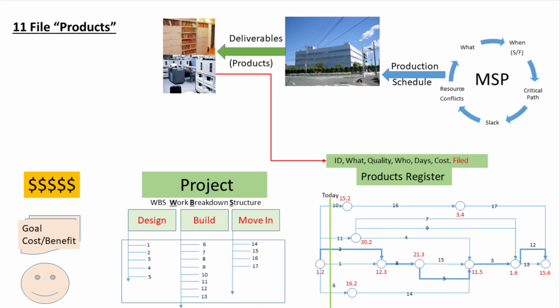This illustrates the discipline needed to account for and keep track of each finished product. A couple of points. First, a product is not finished until an appropriate person says it is. He or she has verified the quality against the intended quality as originally defined in the product's register. The name of this quality control person also appears in the register, although the slide doesn't show it.